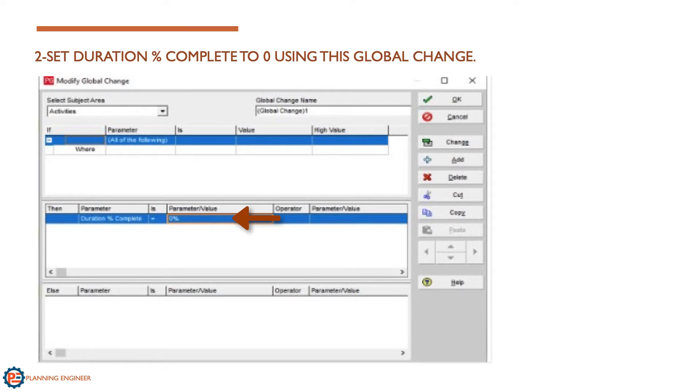If you are using physical percentage complete or units percentage complete in your schedule, you need to make them equal zero as well.